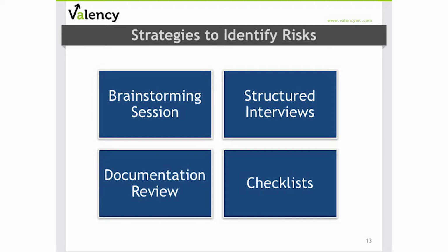The fourth strategy that's very effective is using a risk identification checklist. Many organizations will develop a list of historical risks based on their lessons learned from similar types of projects. In 2014, CII conducted a research team that I had the privilege of serving on, and we published a special report on risk management and identified 27 publications over the course of history with CII that were related to risk identification.